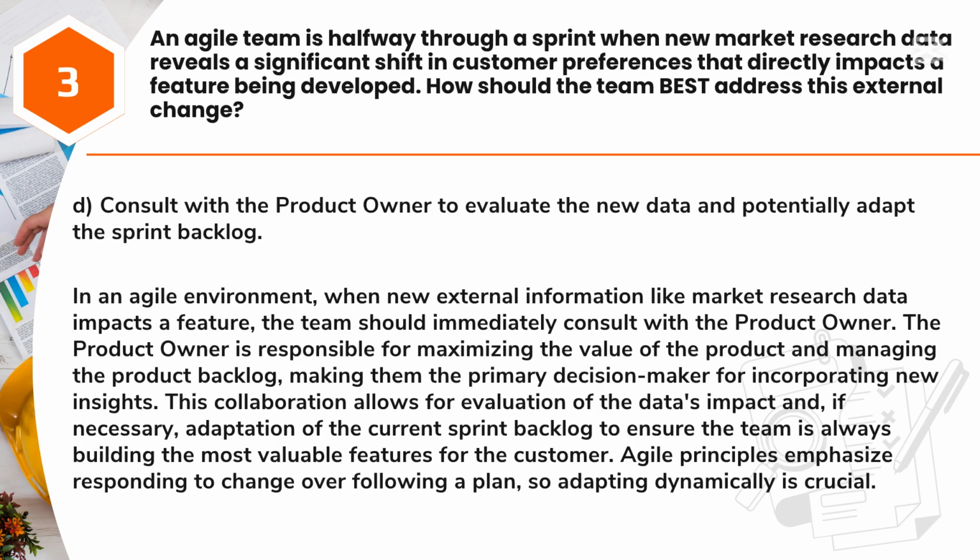Answer: D. Consult with the product owner to evaluate the new data and potentially adapt the sprint backlog. In an Agile environment, when new external information like market research data impacts a feature, the team should immediately consult with the product owner. The product owner is responsible for maximizing the value of the product and managing the product backlog, making them the primary decision-maker for incorporating new insights.